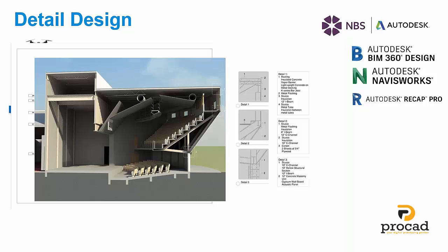Being able to create 3D cut sections through your building just to see how junctions of certain areas might occur, where there could be head height issues, but being able to, even in this example, render that and show that to a client or even to the contractor, to explain where certain details occur, and before they get to site they're able to see these details without having to lose time on site or cause any rework on site.